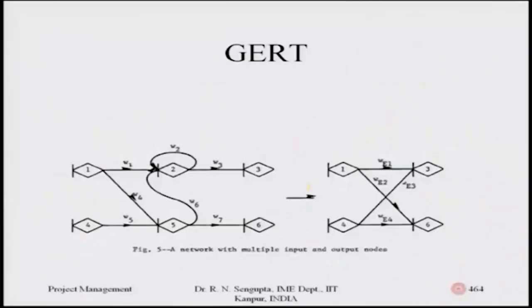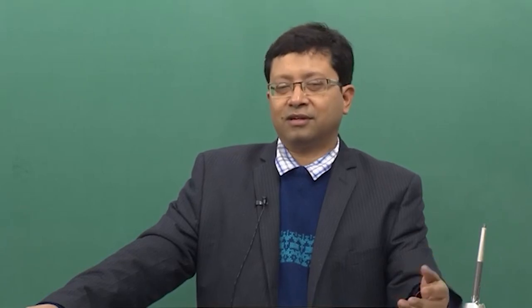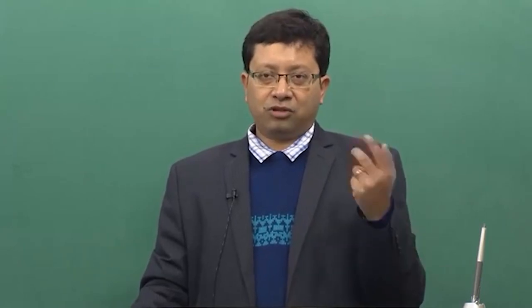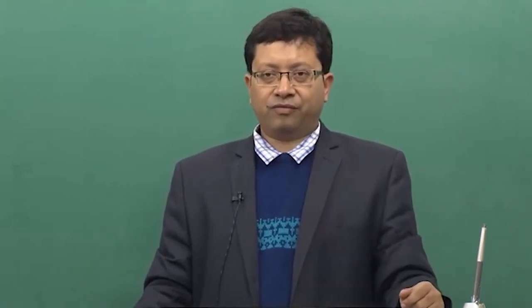For networks with multiple inputs and unparalleled outputs, a diagram illustrates the equivalent concept. The looping, series, and parallel combinations are applied, remembering that you have probability, time, and W functions. Combine the W functions in whatever configuration applies, differentiate, put the dummy variable S to zero, and find the equivalent values — then extract the probabilities and equivalent time.